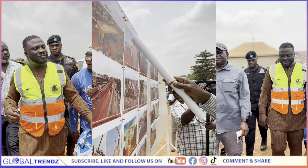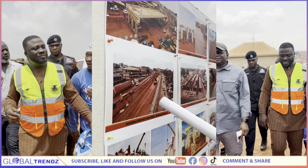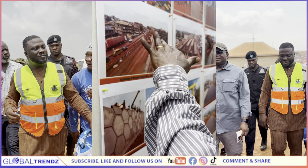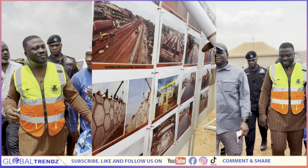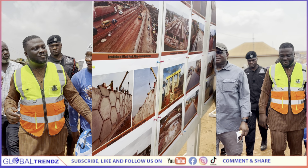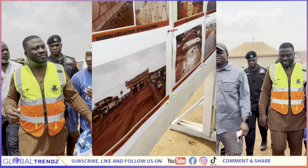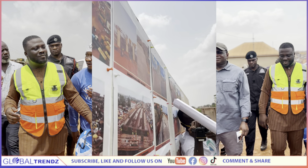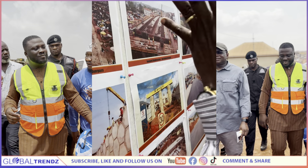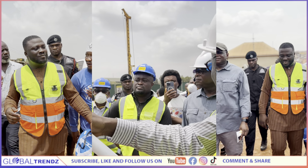So this is the Anomanji overpass. As you can see, we have finished casting the deck, and work is also ongoing on both sides, the approaches. The MSE walls are also ongoing over here, as you can see. If we should go there right now, you would see these activities currently ongoing. And then at the Makro overpass, as you can see, they are now putting in all the reinforcements. They have done all the formwork. And by the end of this month, the contractor has promised to finish casting the deck.